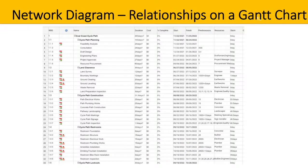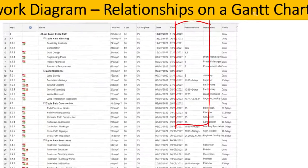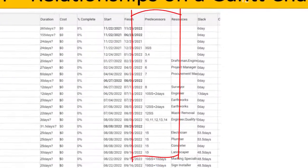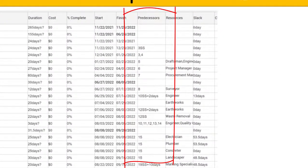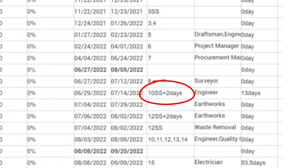In project management software, the predecessor column can be used to show relationships, including the type of relationship and lags and leads. Here is an example: this task has a predecessor task called 10. The SS indicates a start-to-start relationship with a two-day lag, being plus two days. We know it's a lag because it's a positive number.